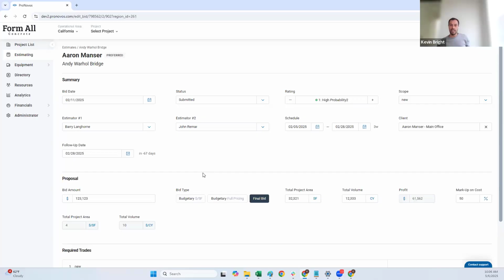Yeah, it's going to vary client by client, and I hate to say it, but the best one is obviously just relying on your, I don't want to say gut, but your relationship with who you're submitting the bid to. Talking to them, understanding, hey, are you the low bid on this project? Have you done a lot of previous work with them? Are they being responsive or not? You can usually get a good sense by just what the communication looks like with the client that you're submitting the bid with, for whether you think that's high probability, low probability, medium probability.